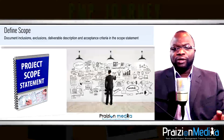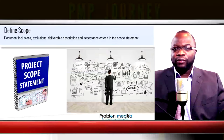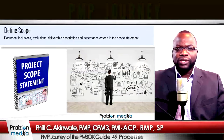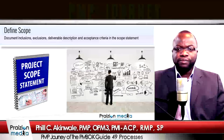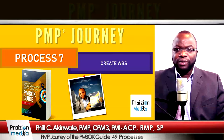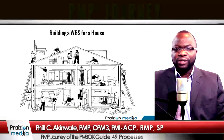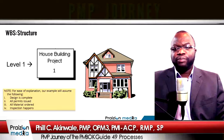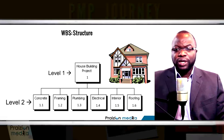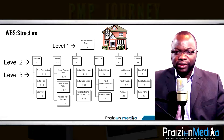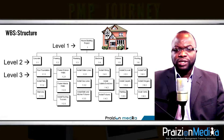In define scope, we want to define inclusions, exclusions, deliverable descriptions, and acceptance criteria, and put all of this into a document called the project scope statement. Process 7: Create WBS. The WBS looks like a family tree but shows how the project scope is decomposed into lower levels of detail. Google the term WBS to get a better idea of this.